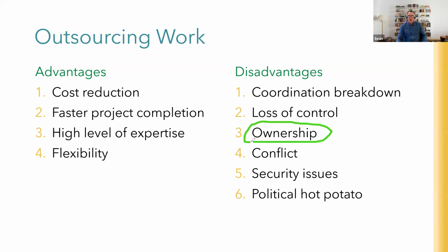As I mentioned before, one of the other disadvantages can be ownership. Who actually owns it? Particularly with things like software plans, even architectural plans, who owns the plans? Software development, who actually owns the code at the end of it? And a simple story to illustrate the point is, if you've ever had professional photographs taken by a professional photographer, the default position is that the photographer owns the photos and only lets you use them for certain purposes.